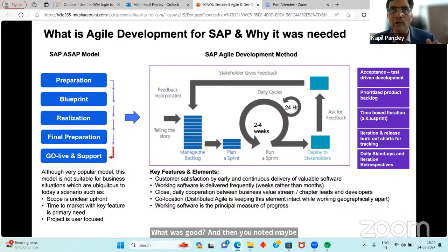Maybe there are some backlog items not covered during the first sprint. So for the next sprint, you will prioritize them into sprint 2. Your sprint 1 backlog will go to the top, so that the moment you start sprint 2, you are covering your sprint backlog if there is any. If there is no backlog, then of course, based on your product backlog and whatever sprint planning you have done, let's suppose you have 40 sprints out of 1,000 backlog items, accordingly you will plan those. Maybe you can execute 4 sprints in parallel if you have capacity.